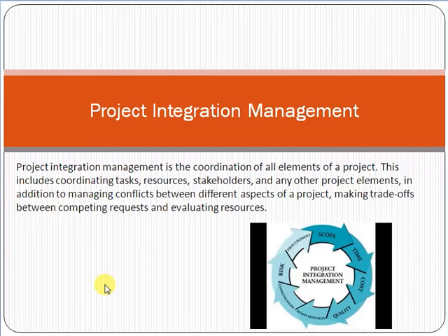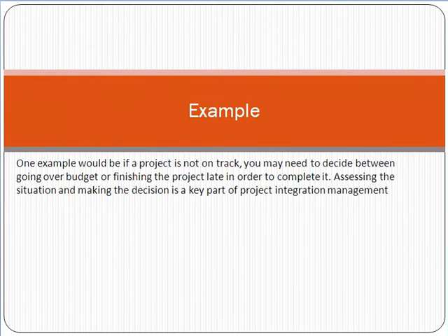As a project manager, you have to deal with all those factors, and to successfully deliver, you have to integrate them: time, cost, resources, scope, budget, communication, risk, issues. Now, just take an example. Take the same example of the e-commerce solution. If a project is not on track, you may need to decide between going over budget or finishing the project late in order to complete it.